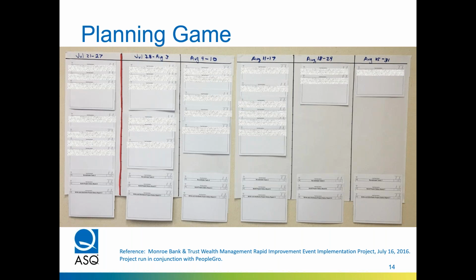you only have so much time. So you got these estimated tasks up in the right-hand corner of each card. And based on the charter, you've assumed so many hours per week. So let's say you've got 5 people on the team, and everybody has agreed that they're going to work at least 2 hours a week on this project. Well, 5 times 2 is 10, okay? So you've got 10 hours to spend every week to get things done.